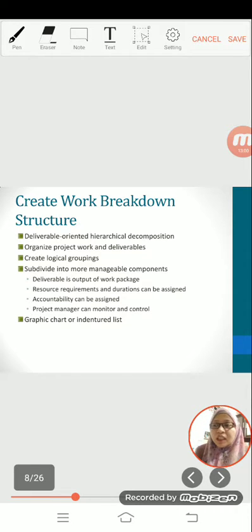Dividing a project into work packages and work items will help a contractor increase the level of confidence that all the activities needed to be performed to produce the deliverable can be defined. The type and quantity of resources can be identified or determined. The associated activity durations and costs can be reasonably estimated.